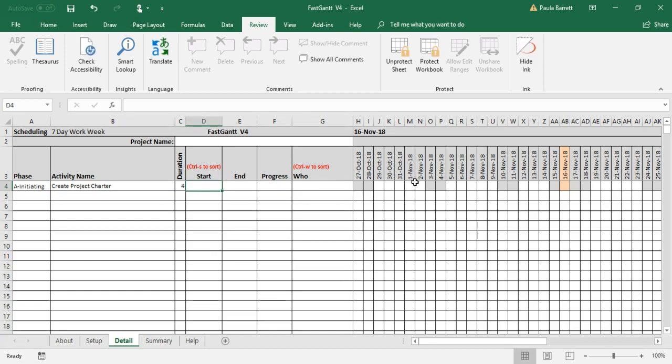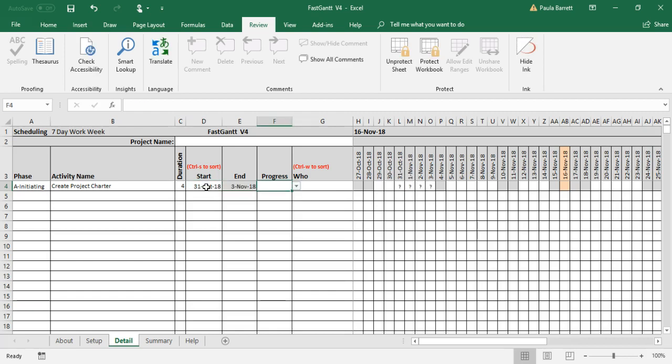And we'll say that we'll start it, let's say we're going to start it out here somewhere. Let's say October 31st. So notice that we've got question marks now and that it indicates that it starts there, but it doesn't really know the status of it. It waits until we indicate where are we on this activity. And there's really three states you can be in: not started, started, or done.